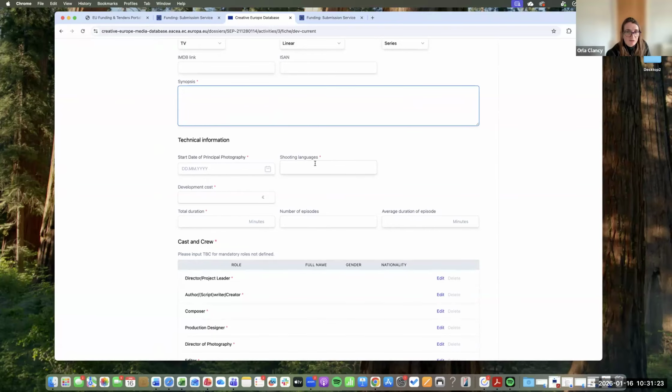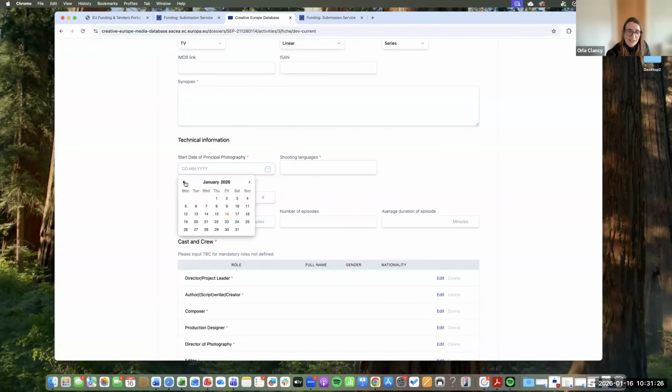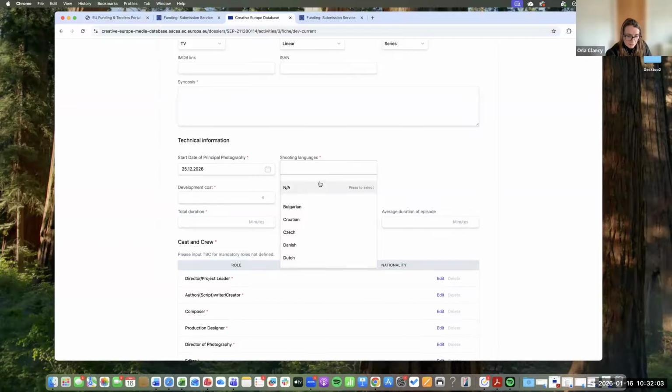Then you put the start date of the principal photography and shooting language, and the most important thing is that you make sure that this is 10 months after the deadline. Okay. So the earliest that this date can be for you to be eligible will be Christmas Day, because that is 10 months to the day from the 25th of February. So if you want to go shooting on Christmas Day, that is absolutely fine. But do not put it earlier than that, because it will make you ineligible, because you have to leave 10 months for development.